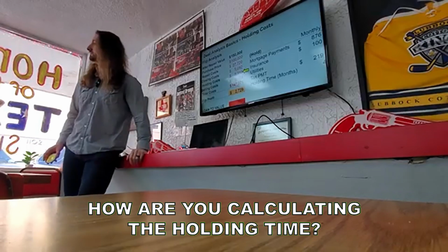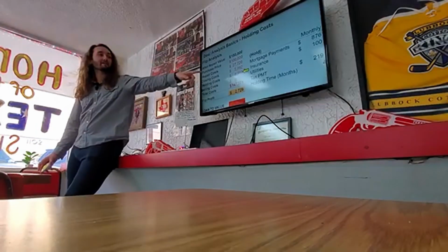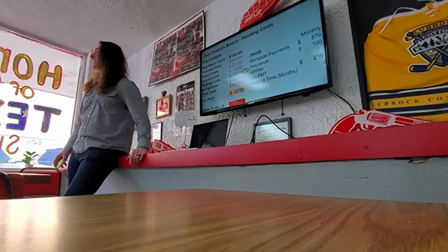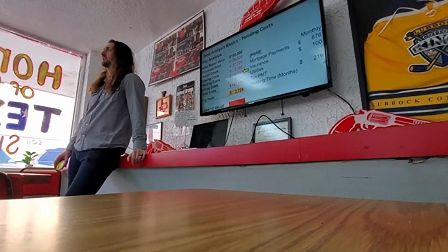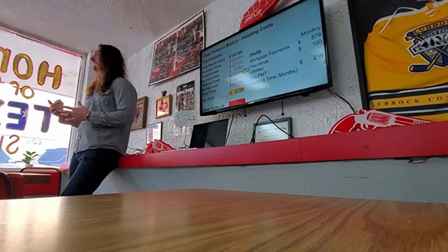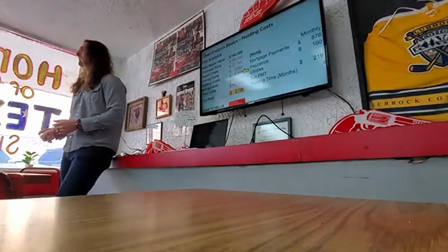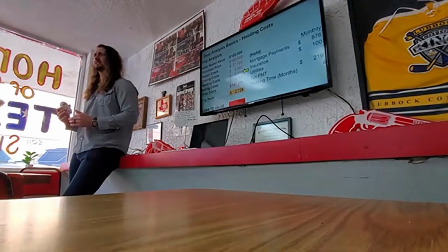How do you calculate the holding time for the repair cost? So holding time is automatically calculated for me. For me, we had to get a track record going, and then it got more down to something that we could build into here. I think for every $10,000 in our repair budget, it'll be 2 weeks, something like that.